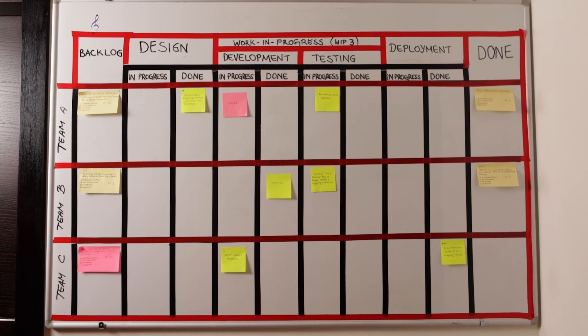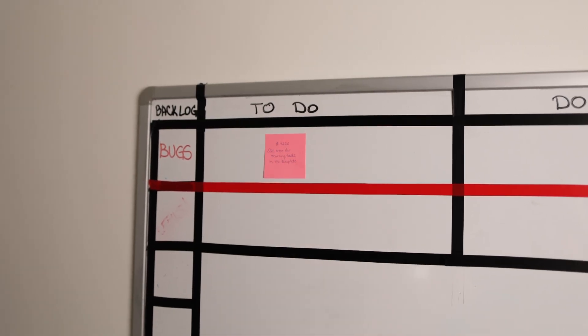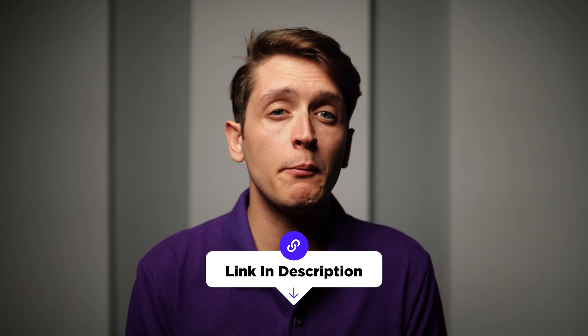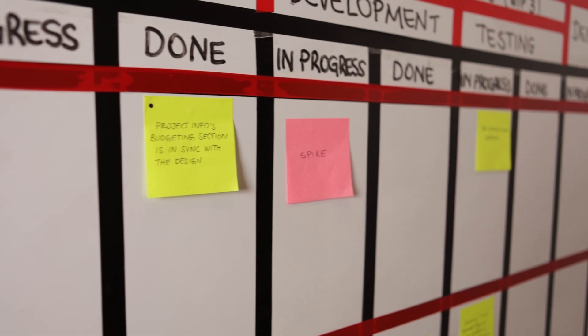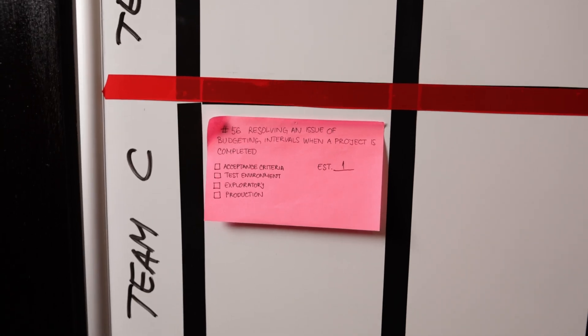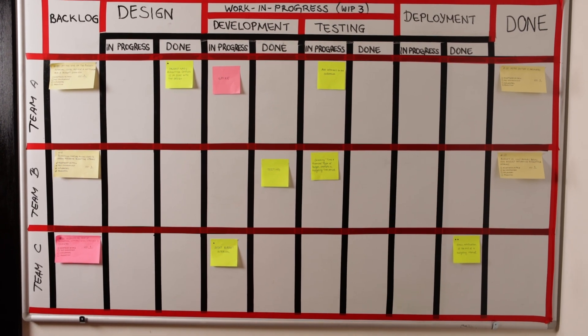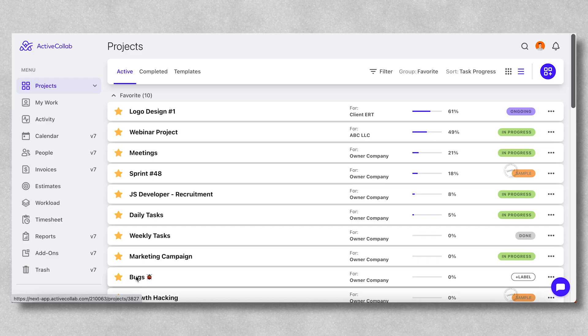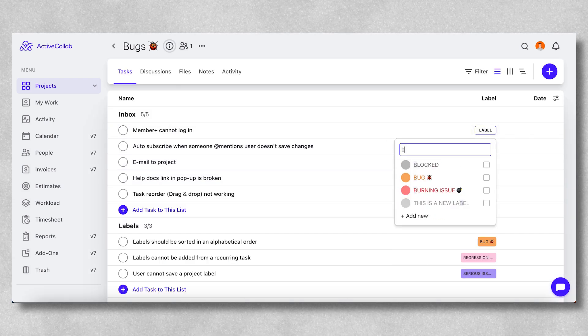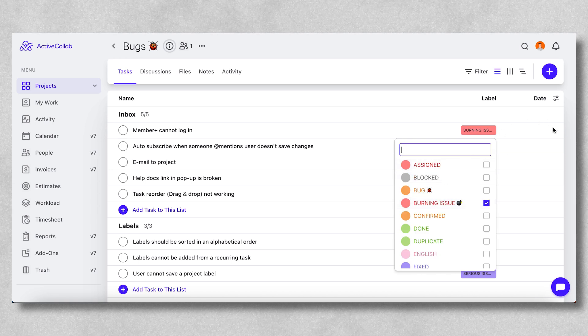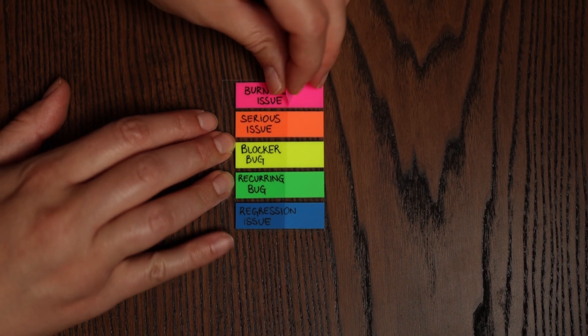Now that you have all the info on the bug and processes going on simultaneously, where do you put it? The easiest way to track bugs is to use a board for visualization and place the bug on it. You can place a bug in a separate column if you use a Kanban method, on a board, or on a timeline depending on your strategy. Make sure the bug is easily spotted, especially if it's a high priority issue, or you could also make a separate board and notification just for bugs. If you're using a digital tool such as ActiveCollab for tracking your work and progress, you can create a separate project for bugs only or put a label on the task and use high priority to highlight the bug. Once the bug is on the board, it is crucial to maintain sight of it and follow it through its lifecycle from the moment it was first noticed and documented. Create a label or think of a way to visually show the stage the bug is in.